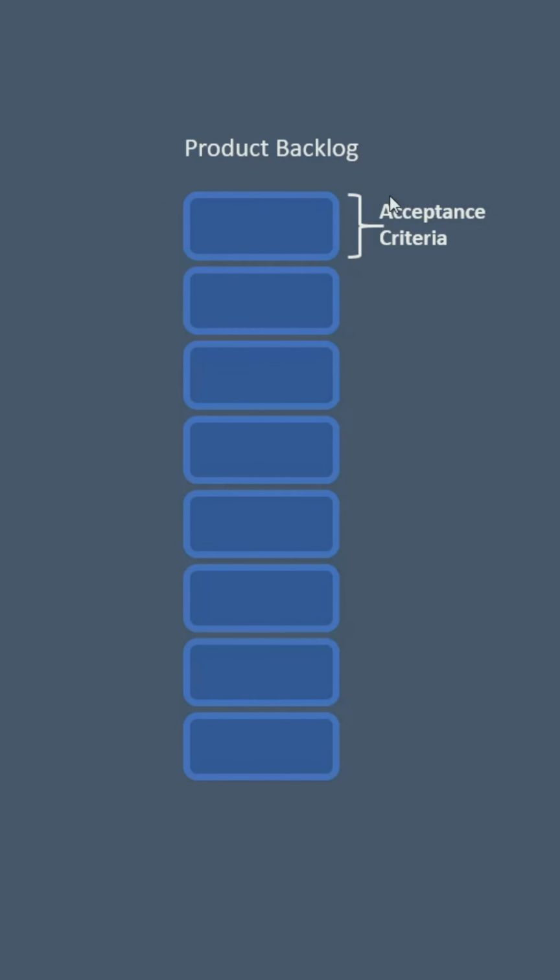that PBI. Now, I don't want you to get wrapped around the axle on this being unique for that PBI. I mean, you may use the same words somewhere else for some other PBI. The point of my statement is that when you write acceptance criteria, you're writing it for that PBI. You're not creating it for some other PBI. You're doing it just for this one. And this PBI plus the acceptance criteria is what makes each item its own special snowflake, or makes it unique. And fundamentally, this is defining what we're building, right? So the product backlog item plus the acceptance criteria describes the uniqueness of that feature that we're building.